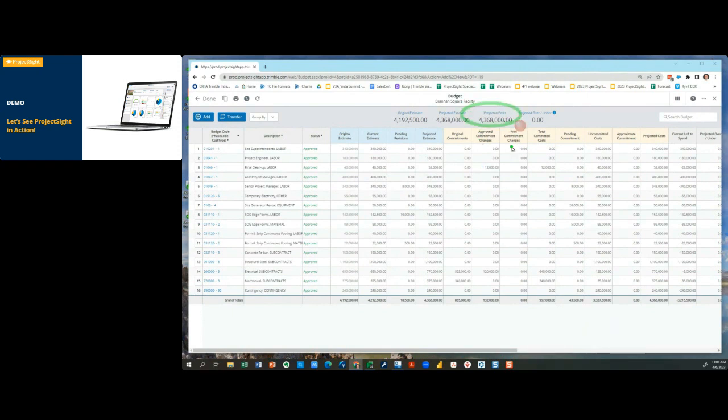That's what we're trying to do here, get these change orders in pending state, so we get our numbers and know where we are. So we're not surprised once these change orders are approved. Oh, I forgot to include them in my forecast, and they kind of blindside you, right? Yeah.